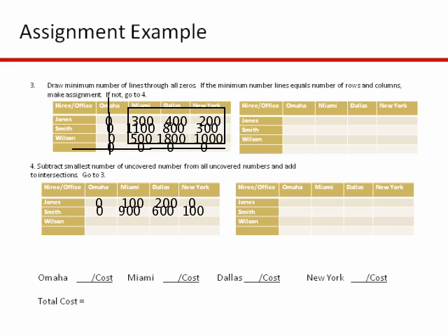And then 800, okay. Now, the intersection there where the dummy and Omaha meet, that's an intersection. Do you see the lines here where they intersect? So basically what we're going to do is add whatever we subtracted there. So we're going to put a 200 there, and then everything else comes down the same, okay? And so once we do step 4, then we go back to step 3.